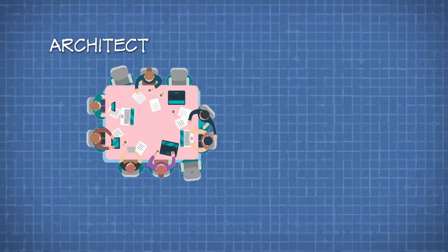That all happens in the contract documentation phase, when the consultants together obtain the development order from the town council. Now, this development order includes building plans, bill of quantities, even wiring plans, piping plans, etc. It's really complicated, really messy stuff, but things are done so it's safe. We know that the building is safe, and then we obtain a development order from the town council. Now we can build stuff.